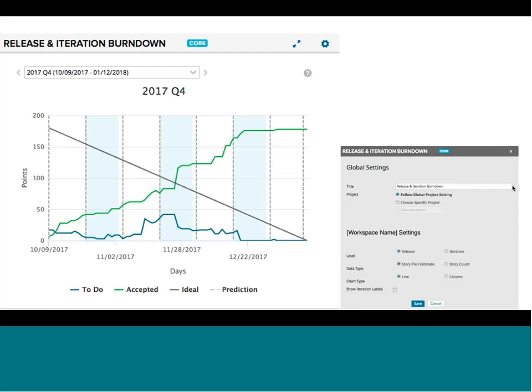One thing to look for in a chart like this is progress being made over several iterations, and if not, why not? And like I just mentioned, is the scope creep chronic? That could be a sign that maybe the product owner is taking on work, not understanding that it's work that we can't absorb as a team. Is the scope growing faster than the team can absorb it, right? Because that means we're going to start dropping work that we may have prioritized previously. So that can be a problem. And also, just making sure that the team is shipping incrementally throughout the development of an epic or a release, or however we're going to phrase this, again, with the broader time box.